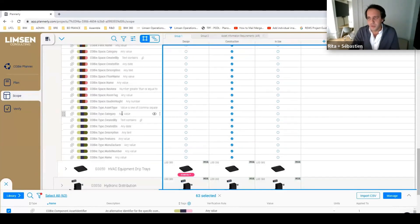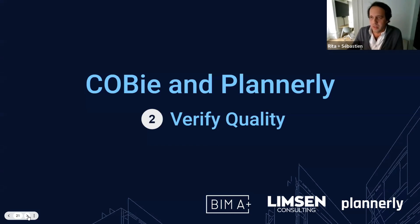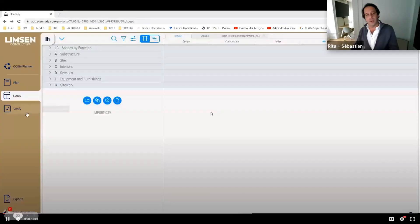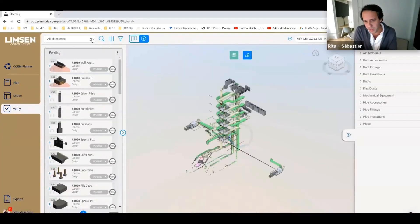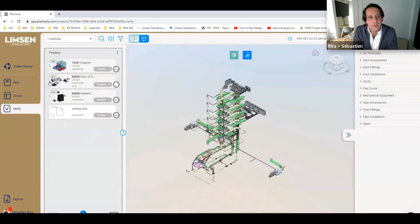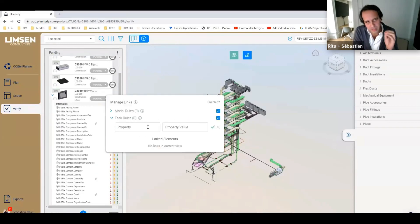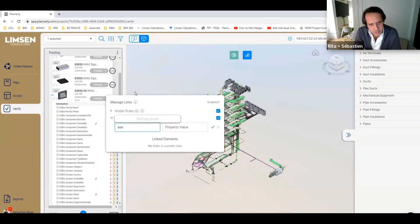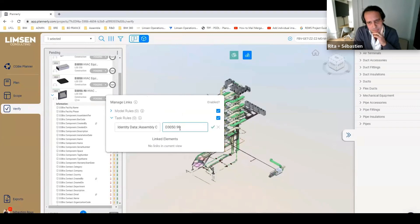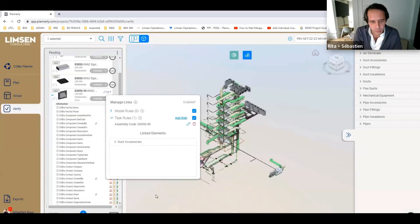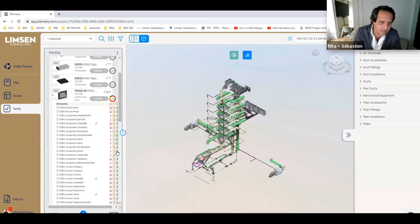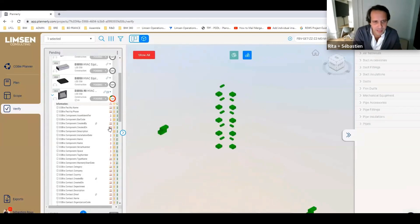This is what the responsibility matrix and the information needs would work with. Going forward, if you want to verify the quality of the handover, you get some models and you can connect those models in the verify module. You are going to connect those models with any particular CDE - in this case, it's Autodesk Docs. You get that model, and that model is already rich in COBE information. I'm going to the mechanical equipment and I'm going to create a rule to link that equipment to the model inside. In order to do that, I'm going to connect it with an assembly code, which is a Uniformat code - D3050.90. And that will connect that card to the elements in the model with that assembly code or that classification code. Then, as you see, it's going to check if the COBE requirements are filled or not - shown as red if they are not, and as green if the COBE requirements are properly filled.